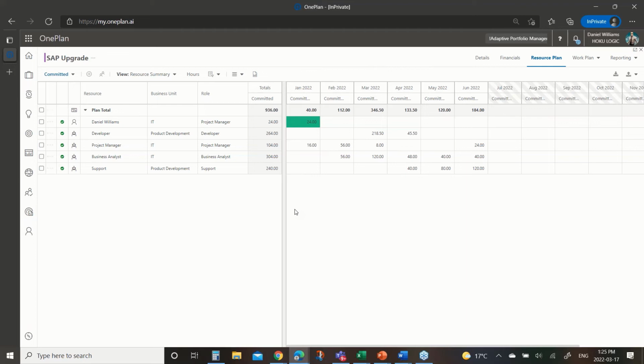Typically, when planning out resourcing at this level in a proposed stage, we're sketching out what the anticipated demand or commitments would be. And so we're in this commitment view, and we're making that initial assessment of where we want to put that time and effort, and what roles we would need. Now, we've got a PM in here, so we've started looking at how an individual might get involved. But first and foremost, we're going to look at this from a generic role perspective, and then later I can swap those in and out.